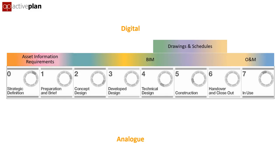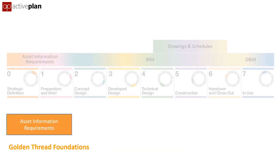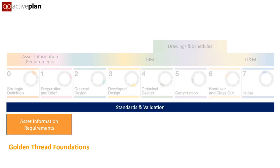To generate the required documents from the coordinated data model — geometry and data — and ensure the right data is being provided in the right format, we need to start by providing designers and the supply chain with a clearly defined asset information requirement. This creates the auditable standards and tests each submission from stage 3 onwards.